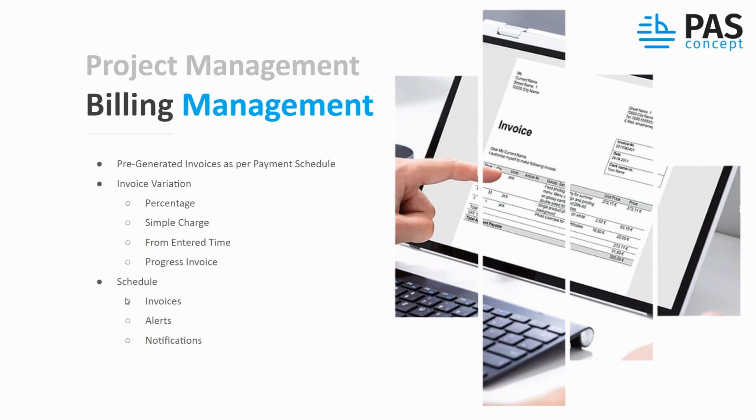Once the job is created, after the client has signed for it, Past Concept will automatically create that job and inherit things like your payment schedule. If your payment schedule is, for example, 20, 30, 50% in 3 individualized payments, those invoices will be there. They won't be sent, they won't be active, but they will exist. So your billing manager knows that these are the segmented payments for this job.